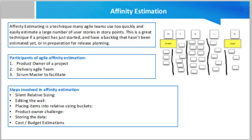The next step is editing the wall. Team members add the relative sizes on the wall. This step involves discussion between the product owner and the team, and the leader can optionally rearrange the order decided in the first step based on their discussion. The wall refers to any physical wall where the stories are placed.